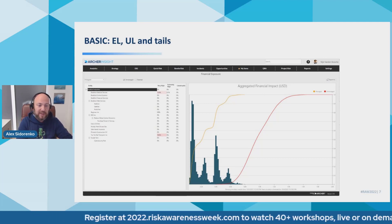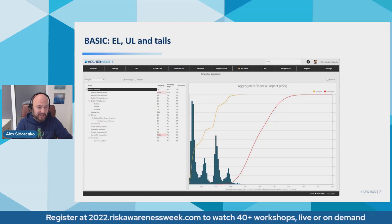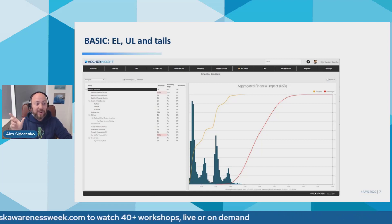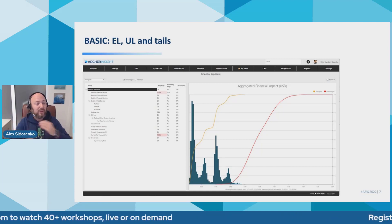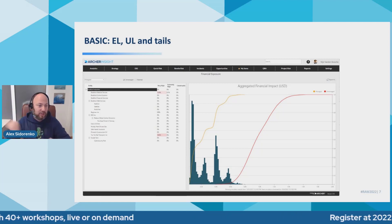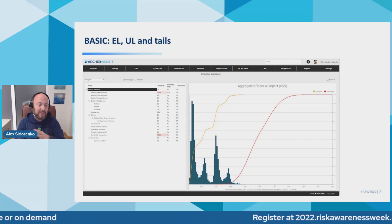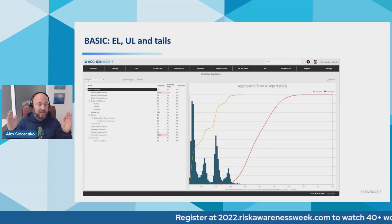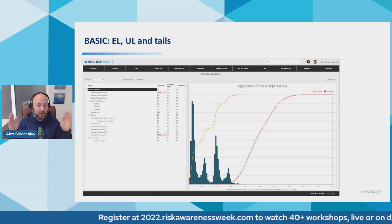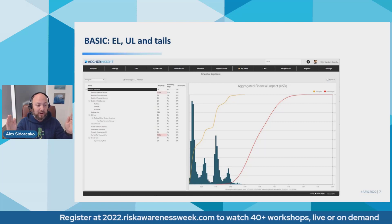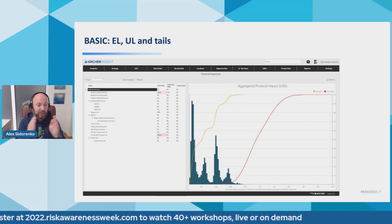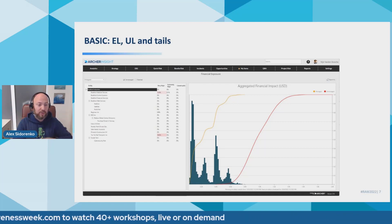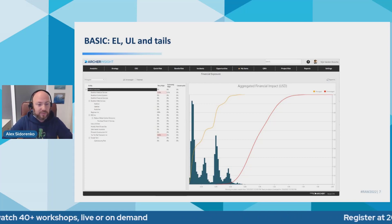You can also correlate risks between one another in case they are related, because depending on whether risks are related or not related, your overall exposure may be bigger or smaller. This is why correlation is so important.